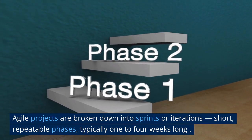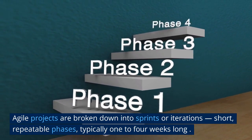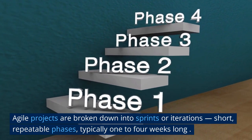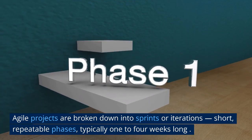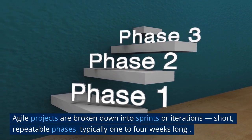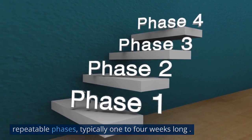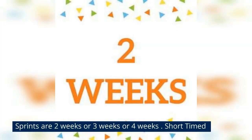Everything has to be done in the time frame — you need to develop the product, test the product, and release the product to production within that one, two, three, or four weeks, depending upon which sprint cycle your project has chosen. The most common sprint cycle is two weeks. This is the most commonly used, but it could be one, two, three, or four weeks. The most popular one is the two-week sprint cycle.